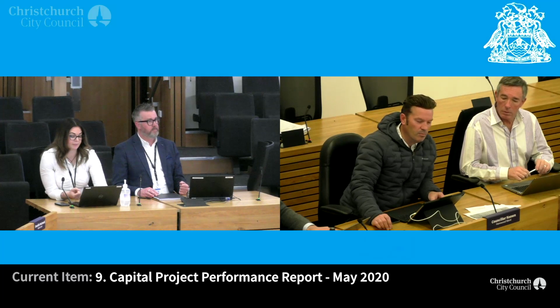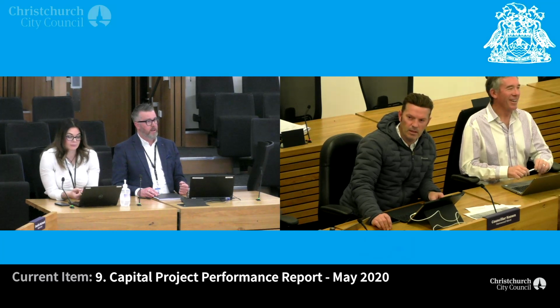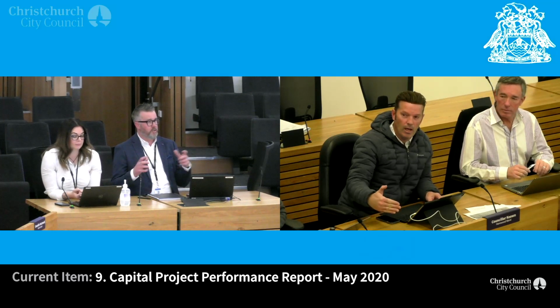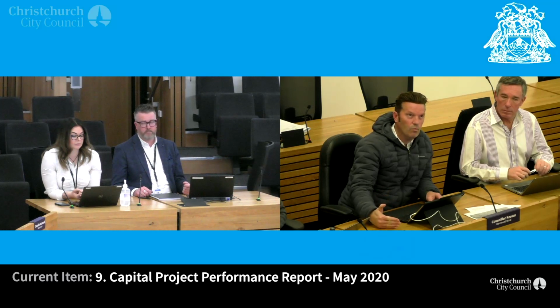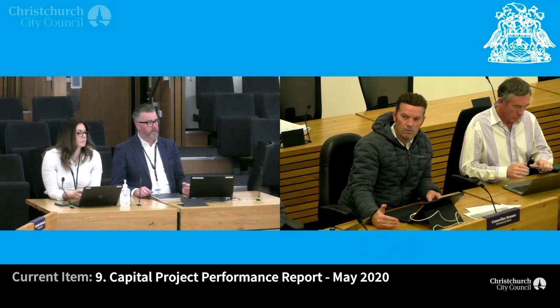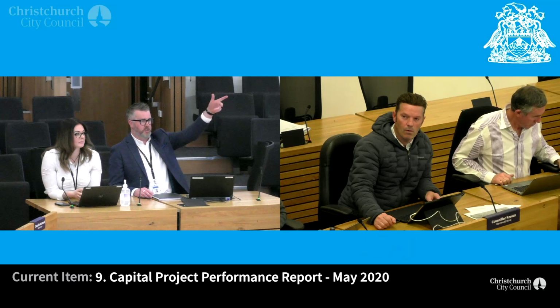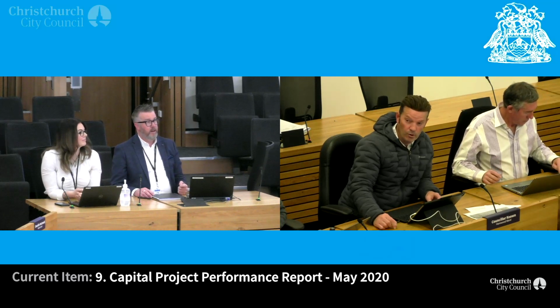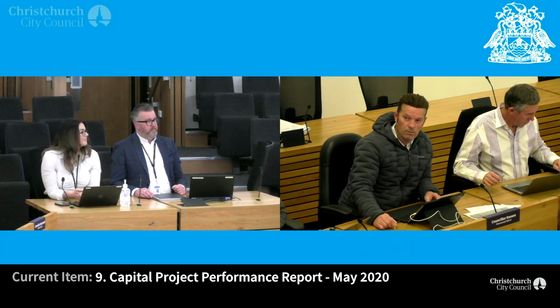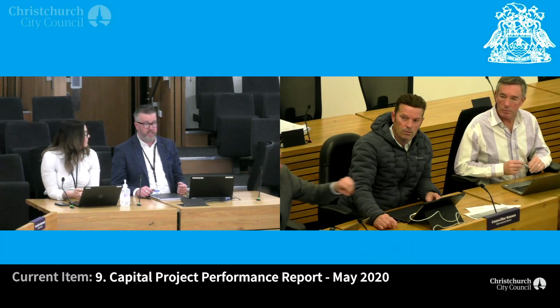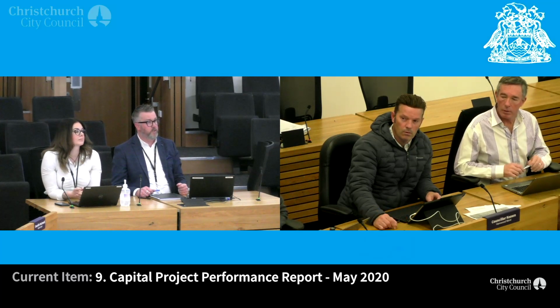So when you say sustainable, does that include the carbon miles for getting it here? No. Right, okay. Whole of life, so no embodied energy costs in concrete and cement and bits and pieces. And that wood manufacturing tech, isn't there a company out of Nelson that do that? There was, and that's who we were going to go with, and they bumped us and then decided to move to Australia. So we had to re-inform our procurement process around a similar product, which is now, unfortunately, coming out of Europe. So only Europe, nothing closer. Exactly. The budget we had to work within is what we've ended up with, a fantastic solution, and hopefully you'll be able to get through and have a look shortly.